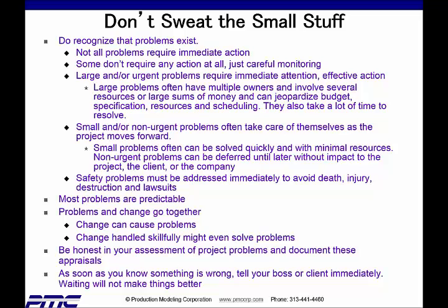Problems and change go together. Change always can cause problems. Be prepared for that. Change handled skillfully might solve a lot of problems, though. Be honest in your assessment of project problems and document these appraisals. Keep all problems and all issues on a separate individual sheet that you're going to track. You also may want to put that on your project scope sheet if it affects project scope.